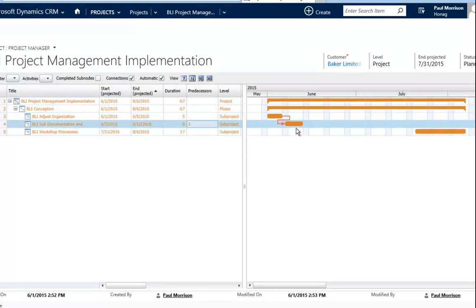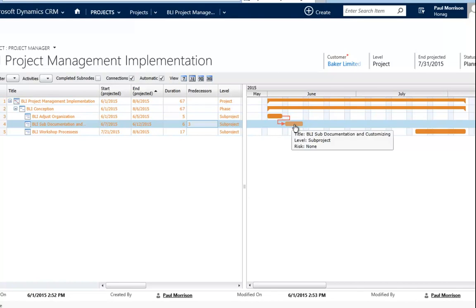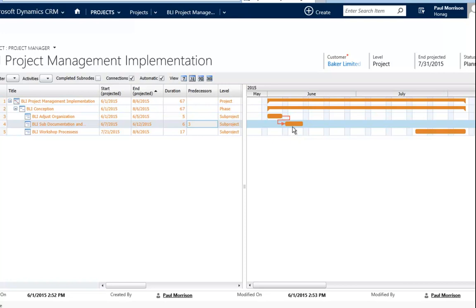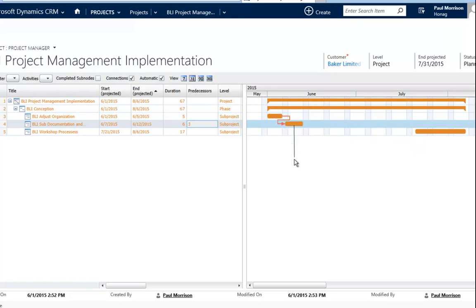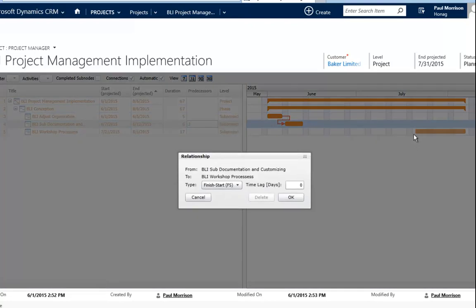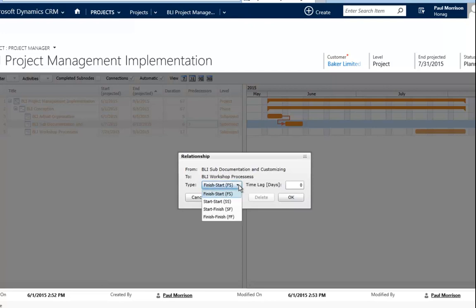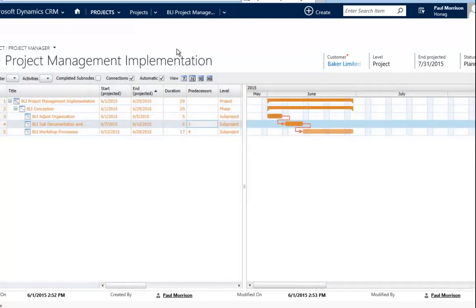The second possibility is to do it within the graphical Gantt. What you need to do is take the mouse in the middle of the bar, grab it and move your mouse down. I always recommend to do it in the middle and move it down. If you take it and move it on the right, it will move then. So take it, move it down. You see this black line and then move it to the project node you want to connect to. I want to connect to the processes. Leave that and the relationship window will open. Here you have the additional possibility to select the relationship types, set up a time lag. But if you say ok, the relationship is done also.